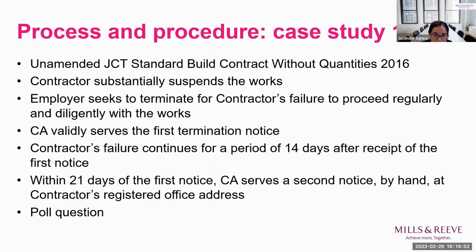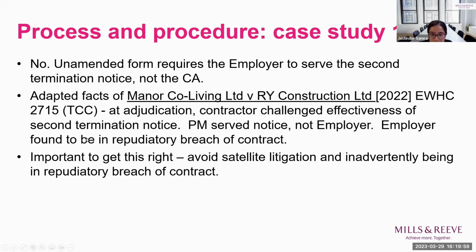Okay, great. Just moving on to my second slide. So 63% of you said yes and 37% said no. The correct answer is indeed no. And that's because the unamended form requires the employer to serve the second termination notice and not the contract administrator. And those were the adapted facts of Monaco Living Limited, where at adjudication, the contractor successfully challenged the effectiveness of the second termination notice. The basis of this was because the project manager served the notice and not the employer.